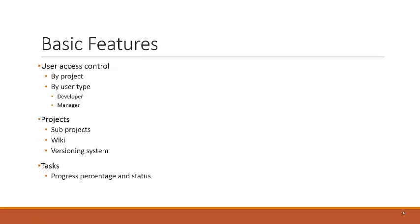So now I'll go through the basic features of Redmine. The first one is that it has user access control, which means you can create your own users and give them visibility by project. There's actually two built-in roles: the developer, who is able to update a task and set what's the percentage of progress. But only the manager is able to close the task. So usually the workflow would be somebody doing development and then a manager checking if the task was done correctly.